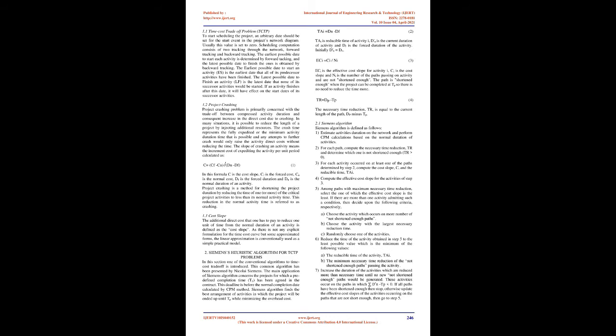The earliest possible date to start an activity (ES) is the earliest date that all of its predecessor activities have been finished. The latest possible date to finish an activity (LF) is the latest date that none of its successor activities would be delayed. If an activity finishes after this date, it will have an effect on the start dates of its successor activities. Project crashing is primarily concerned with the trade-off between compressed activity duration and the consequent increase in direct cost due to crashing. In many situations, it is possible to reduce the length of a project by injecting additional resources. The crash time represents the fully expedited or minimum activity duration possible, and any attempts to further crash would only raise direct costs without reducing time.